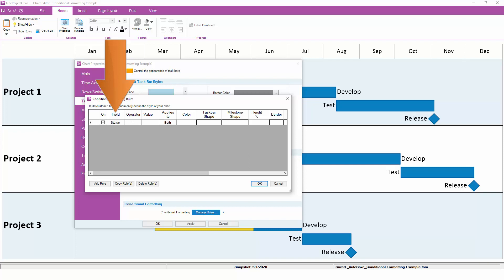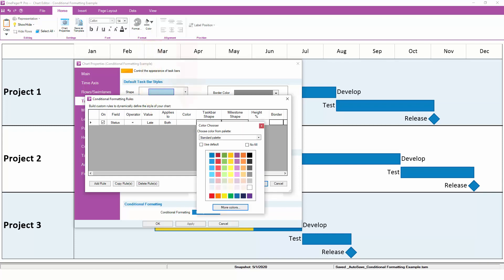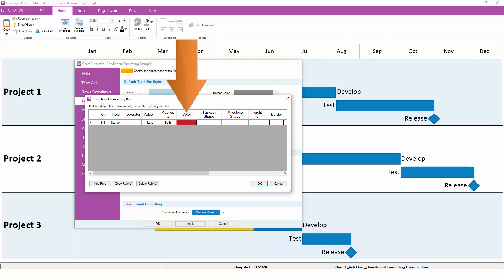Enter Late as the value to compare against. Finally, pick a red color from the palette. Our first rule clearly states that if a task's status is Late, it should be colored red.